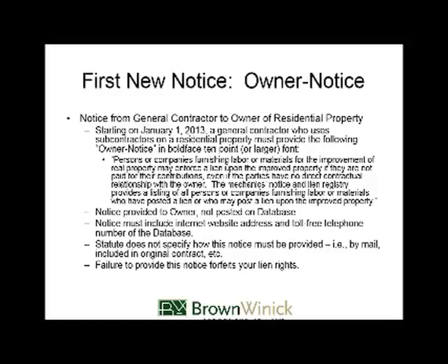My suggestion and my advice to you is to make sure that your clients, who are contractors building homes for people, include this language in their form contracts so that it's automatically in there, and you can point to that directly by showing a court the provision of the contract that has this notice in it. If you don't have a client who does that, mail will work. I would suggest some sort of mailing that gets you a receipt that shows it's been delivered or is otherwise tracked.